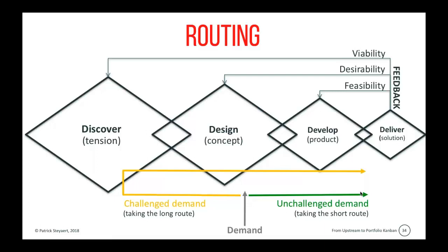So triage in this case boils down to routing. It boils down to routing in terms of, if a request comes in and it describes a certain solution, the question is, do we challenge that demand? Do we take the long route? Do we challenge the customer and ask what is the problem that solution tries to solve, or do we leave the demand unchallenged?